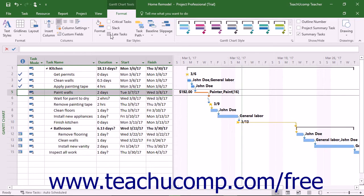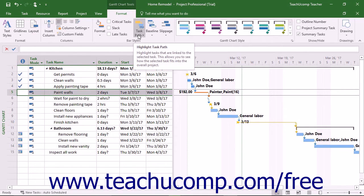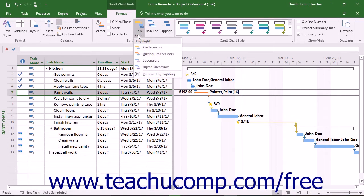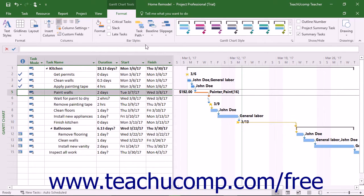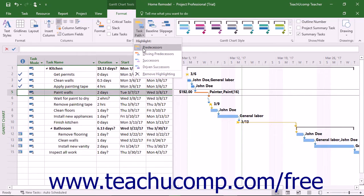To highlight predecessor and successor tasks of the currently selected task in the Gantt Chart view, select a task in the Gantt Chart, and then click the Task Path drop-down in the Bar Styles button group on the Format tab of the Gantt Chart Tools contextual tab in the ribbon. Then select the type of relationship to highlight from the drop-down menu: Predecessors, Driving Predecessors, Successors, or Driving Successors. To turn off the selected highlighting, select the same command again.